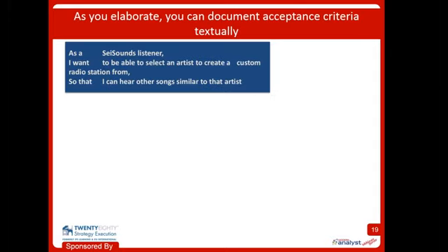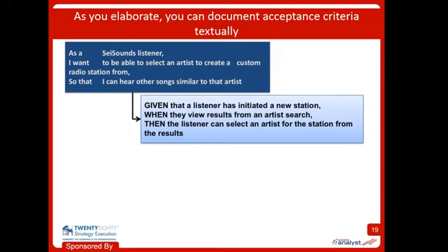We've talked quite a bit about finding user stories. I want to talk a little bit more about the elaboration of those user stories. So mock-ups are good because they put the visual to it. But as you get into elaboration, you're going to create what we call acceptance criteria, okay? And let me show you an example of one here. This is a common construct for them, a given, when, then statement to write an acceptance criteria, okay?